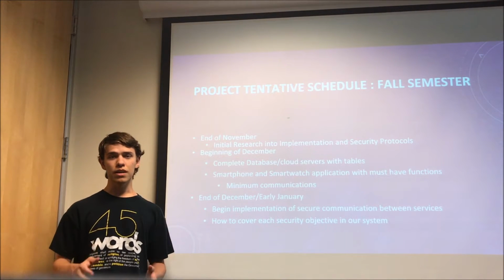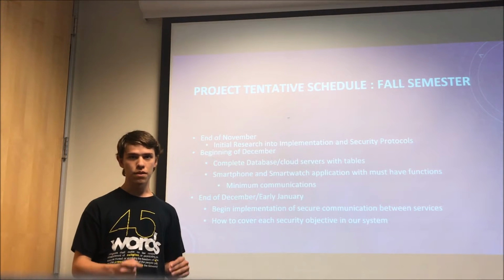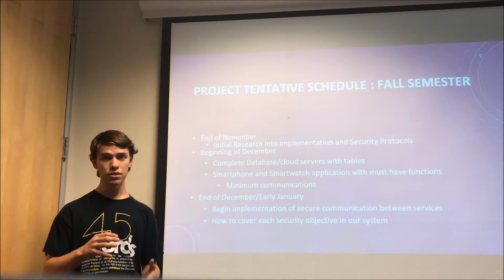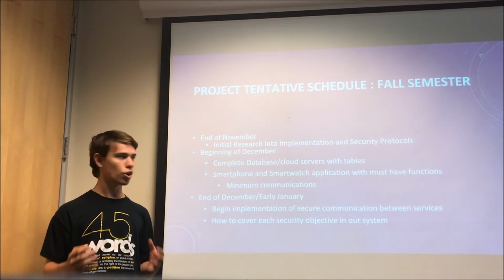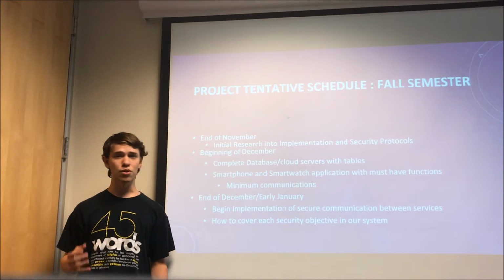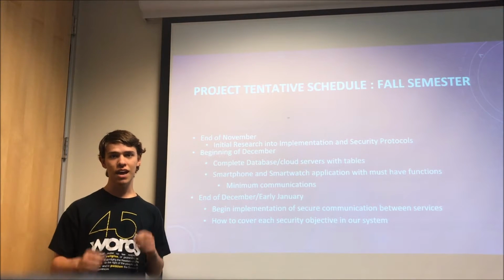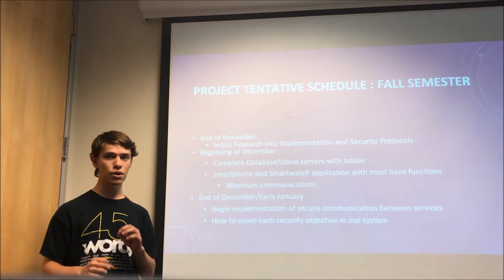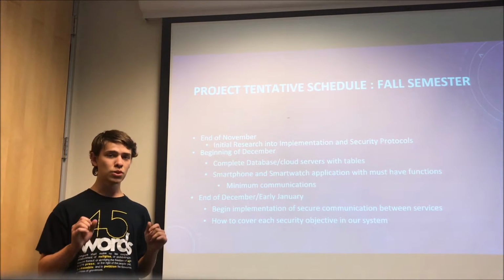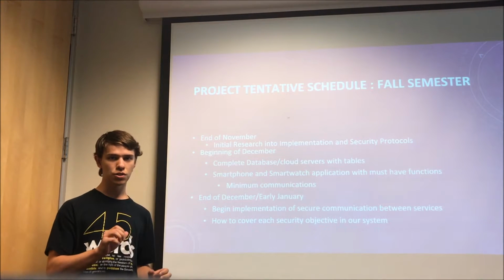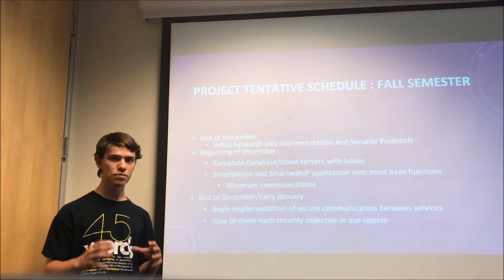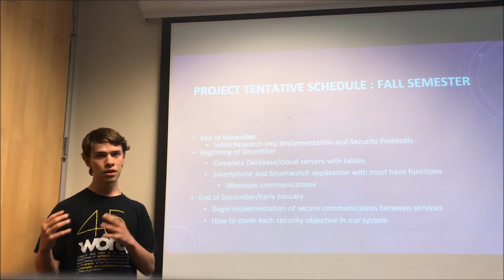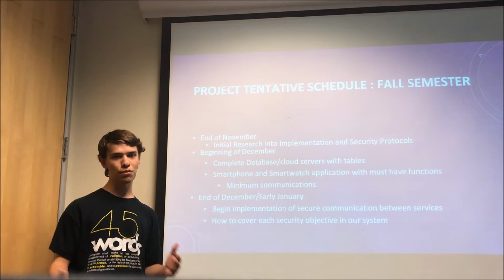So initially, by the end of November, we would like to have research into the implementation done and have started to work on the project. By the beginning of December, we would like to have completed the database, have it set up. We would like to have the smartwatch set up, and we would like to have the smartphone app set up. Between those, we will have simplistic communication. The focus of our project will eventually be securing that communication, but we need a proof of concept to prove that it works before we ruin it with secured